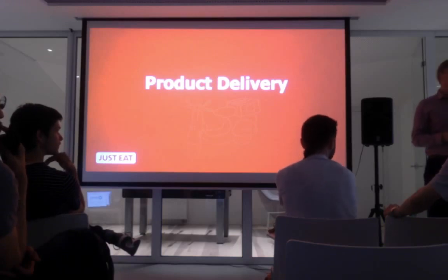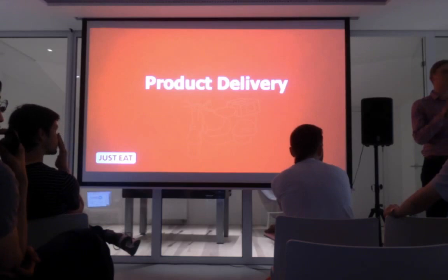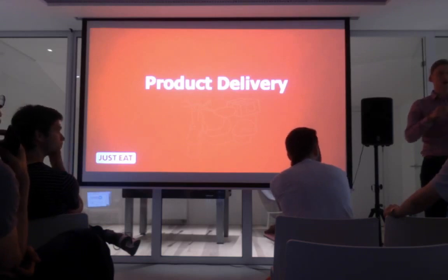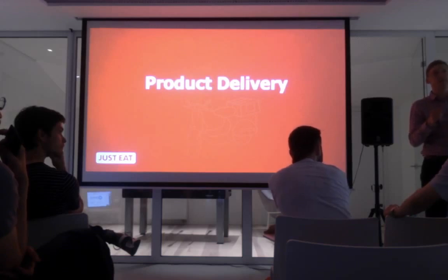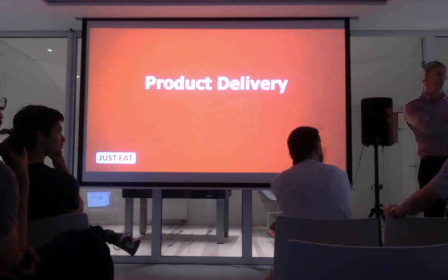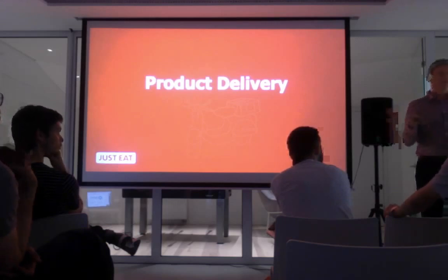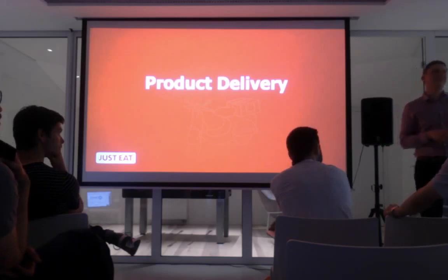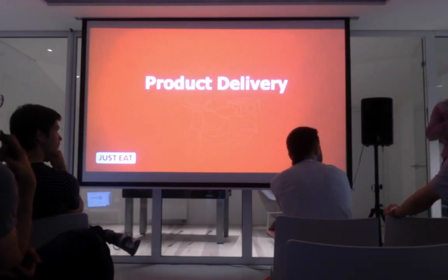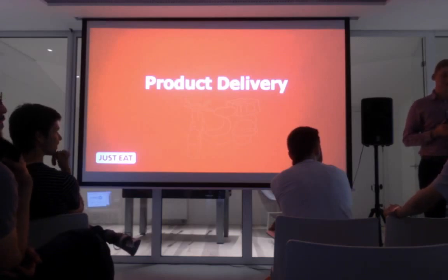So Kanban, no work in progress limit, and the reason we can afford to have Kanban is because all the developers are very senior, the team is in sync, and we have the sort of culture where if you say you will do it, you are actually doing it. You don't need to measure against it, right? It's a bit relaxed. For myself, I check the cycle time, it's 1.5 days. Very fluid, put it this way.